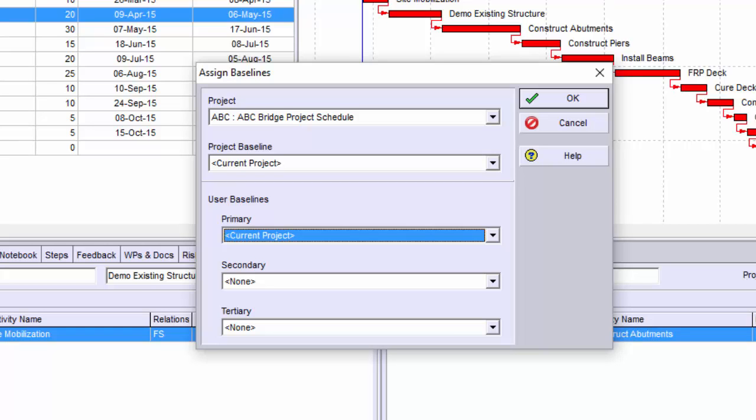If I'm only comparing one baseline to the current project, then I assign that baseline as the project baseline. If I need to compare more than one baseline, then I would use one of the user baselines.